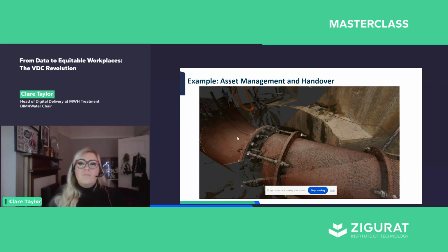I'm in the water sector. We have a defined work breakdown structure from our clients, and that's according to the assets, and we use things like Uniclass to define the coding for those. If we can marry up the 3D model with that coding and the P6 model, link the two, we can also tie in commercial data, all our folder structures, all the design deliverables. We can start to see that that's going to make our lives so much easier, and that's where we gain the efficiencies. So it is those investments in time that help support.